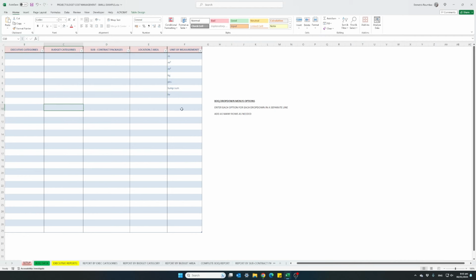There are three lines because we chose to break down each quantity per area for the reception lobby, treatment rooms, and exterior areas. This practice of breaking down your costs into your project areas is recommended so that you can control costs and see which area is costing you more or less.